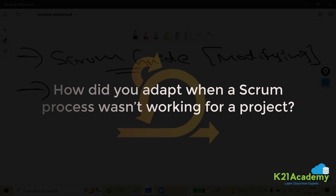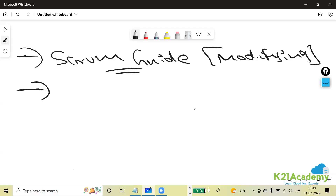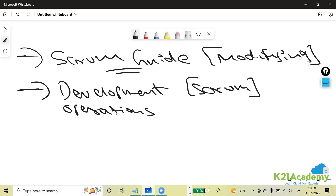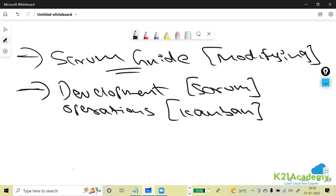Remember: there is no mandatory rule that you must use Scrum. When there is no requirement for it, why use it? Under Agile, Scrum is one framework and Kanban is another. If your project is more development-focused, use Scrum. If your team is more into operations work without development activities, use Kanban. It all depends on the nature of the team and work — that's how you choose your framework.